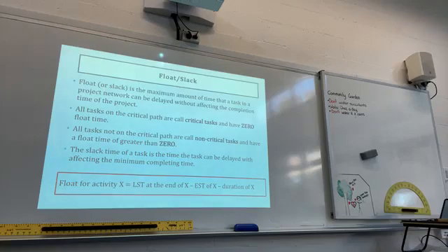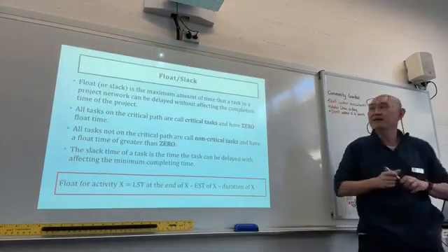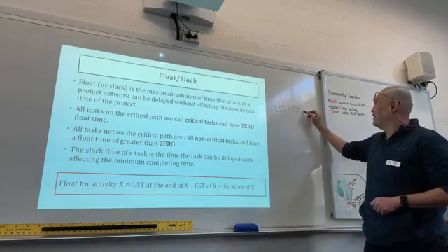So this is a basic project network that you need to know how to analyze. Forward scan. So the duration would just be the total of the edge. I'll go back to that in a few minutes. Alright, now let's go back and have a look at this. So if you write down later start time, take away earlier start time, and take away the duration.